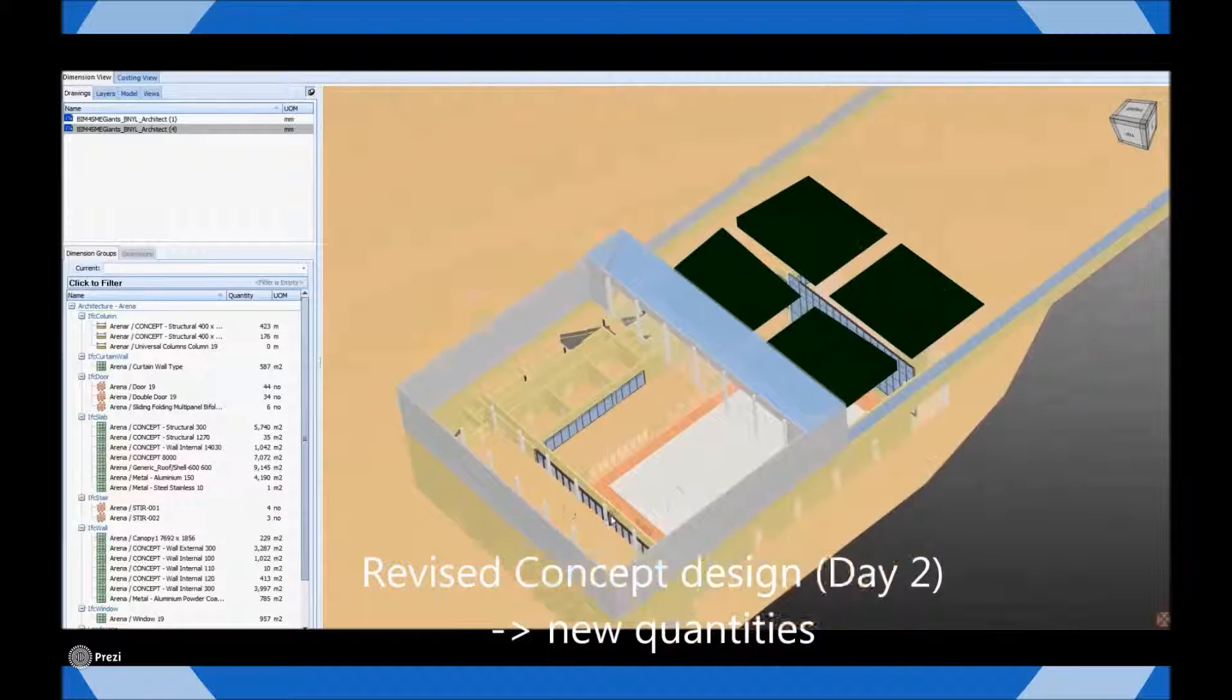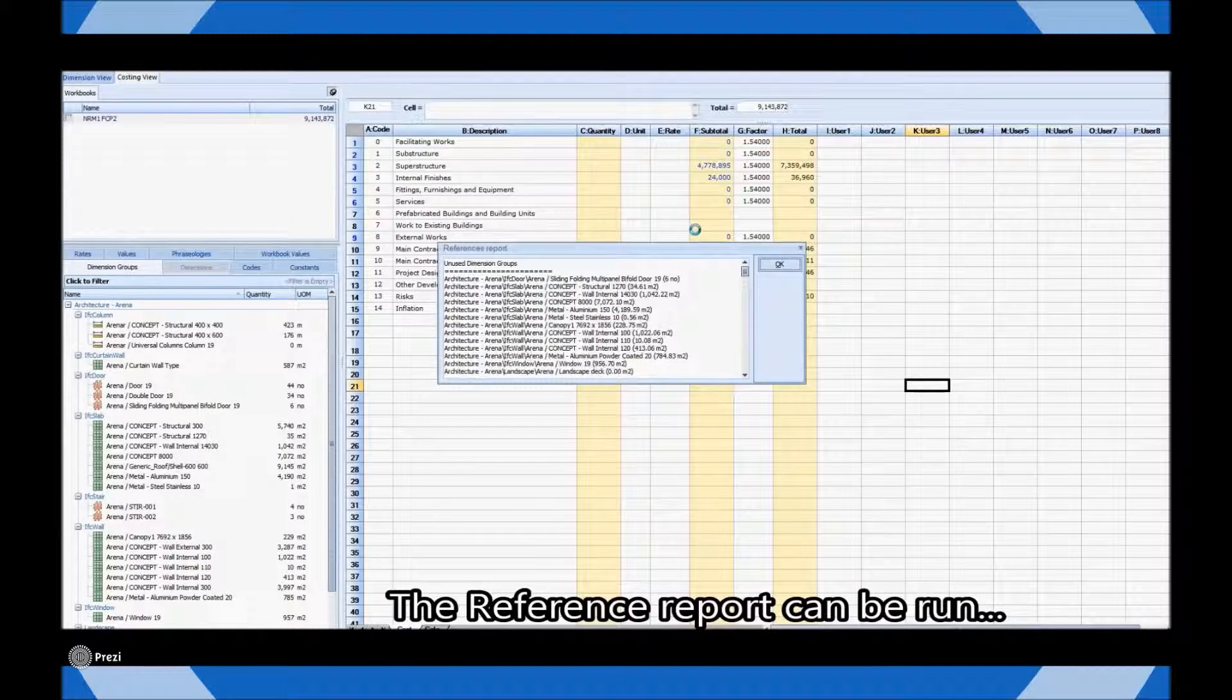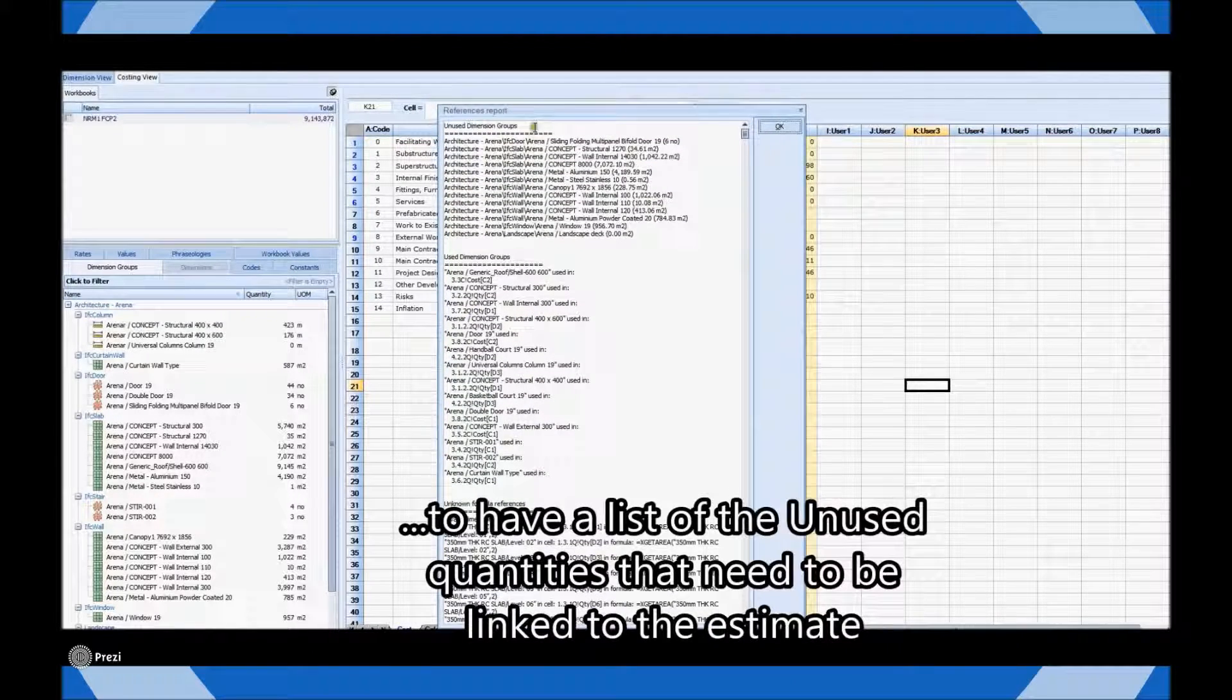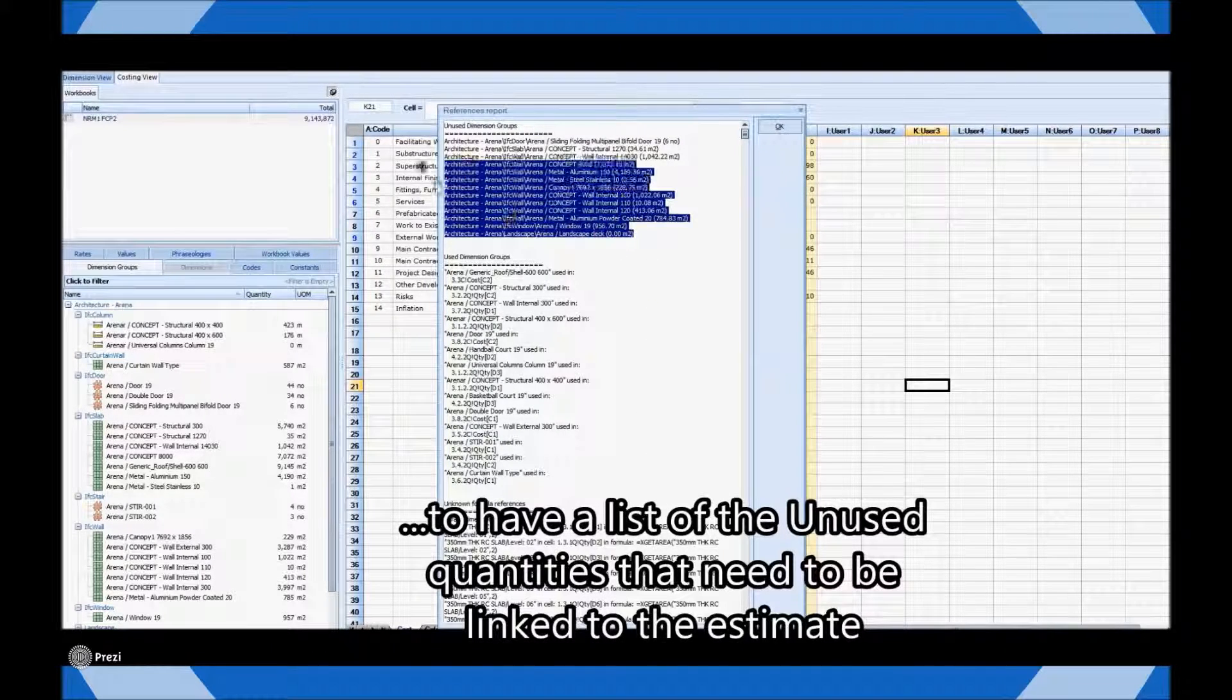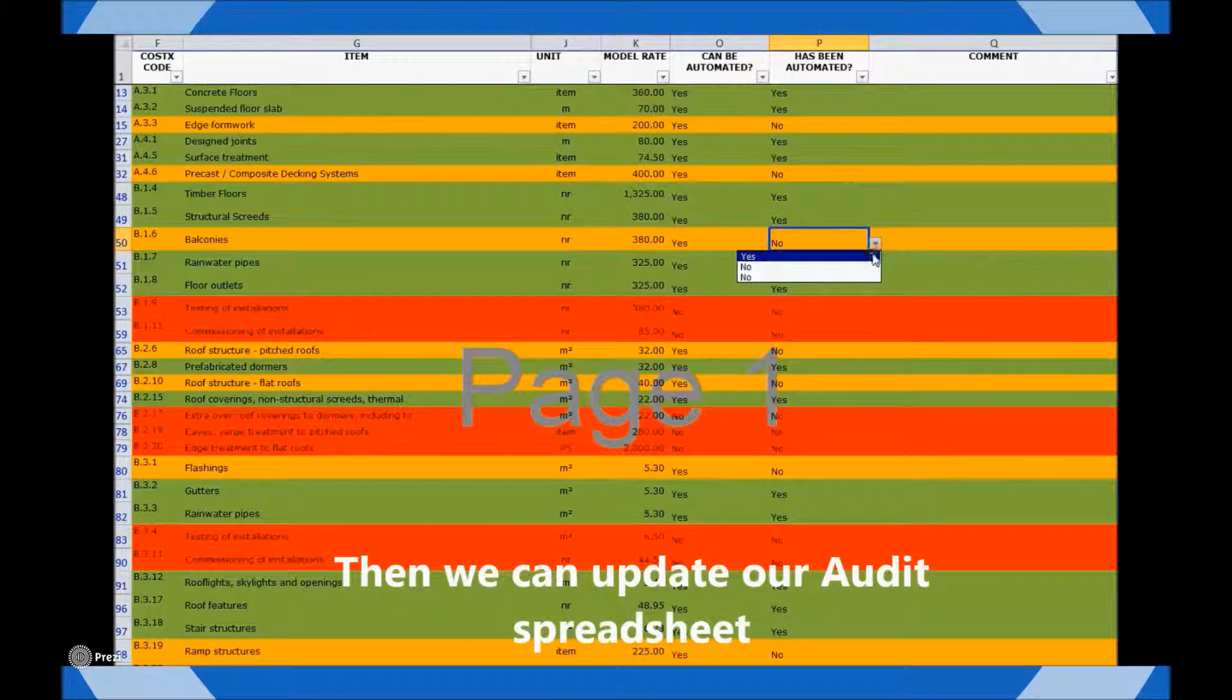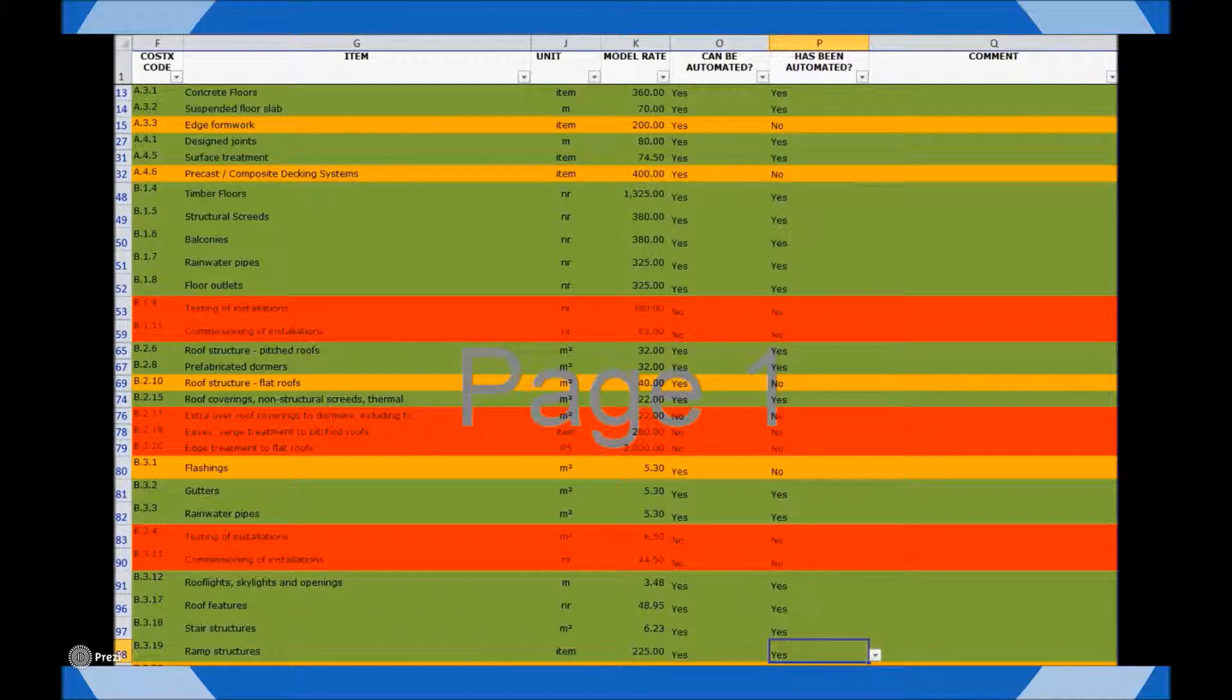At this stage the project QS can quickly produce a report detailing which of the model's objects have already been incorporated into the cost plan. Extracting this information to a separate audit tool ensures that cost plan allowances are gradually and methodically linked to the building information model driving accuracy. Using this type of tool we can again work with the design team to help drive development of the model to ensure that information is supplied at the right time.